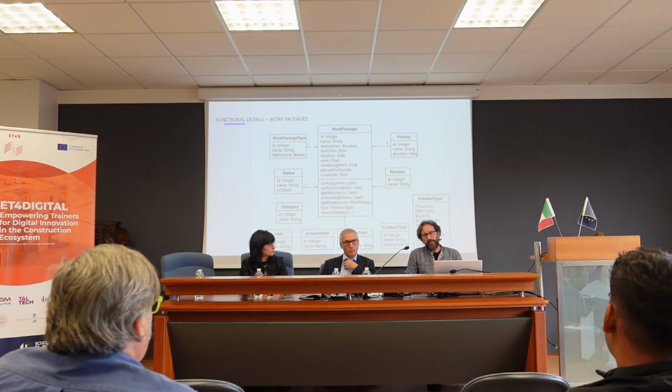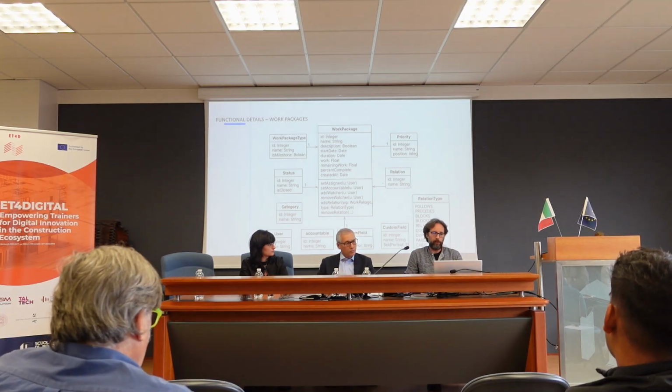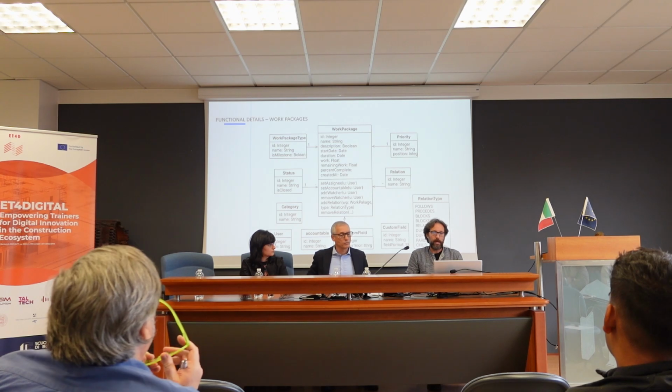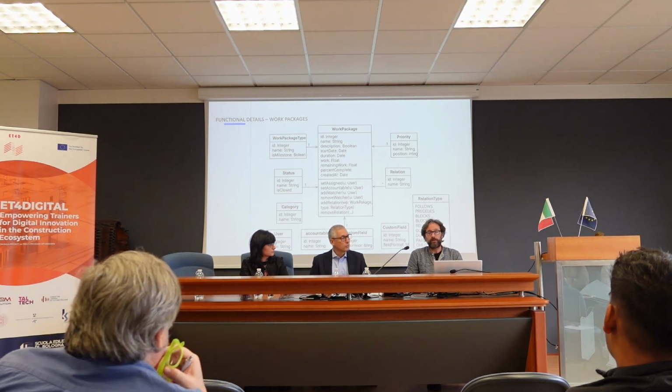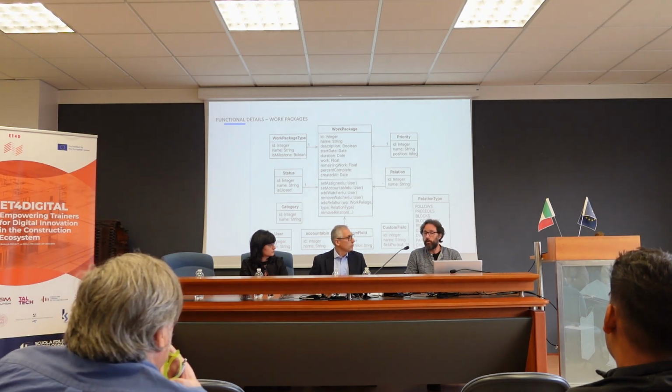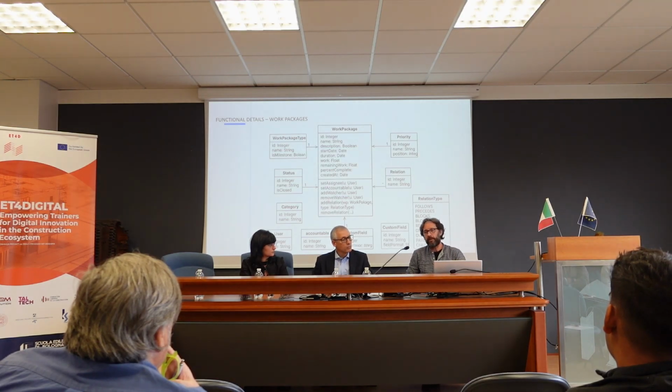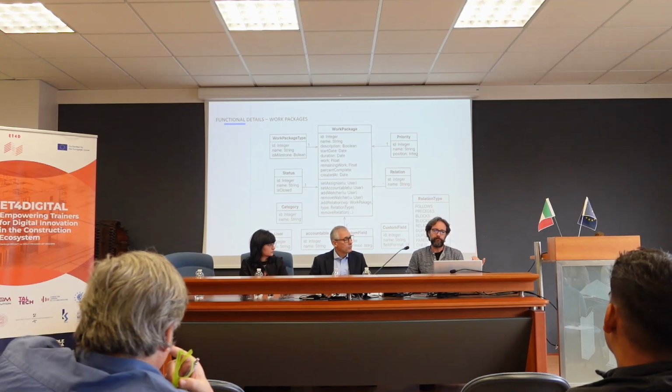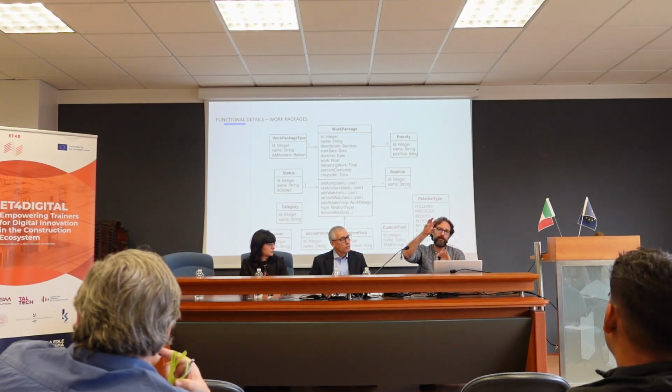We can set who's accountable for that work package. We can add custom fields, we can add custom work packages to it. And we can set the relation type there is between a work package and another. We can say what is following, what needs to be preceding that work package. We can set a work package parent and child.